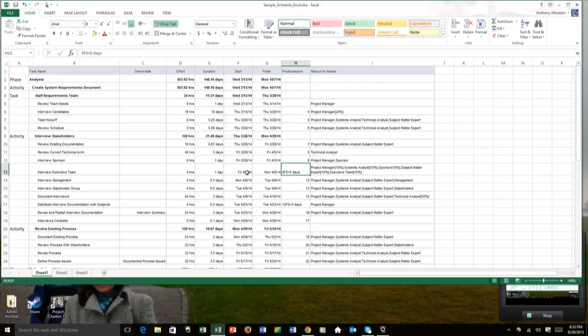So that means, well, I apologize. That did not work out the way I planned. That should be beginning 4 days later because I'm putting 5 days of float. Why? I'm interviewing an executive team. I don't know that they're going to be available when it's convenient for me to be available. So I put 5 days of float.